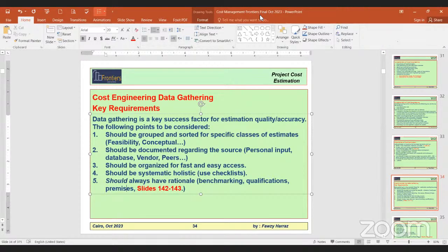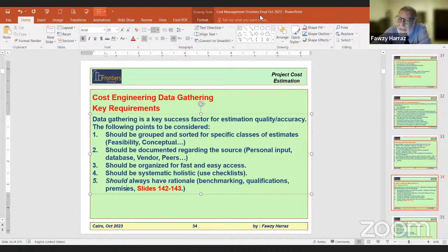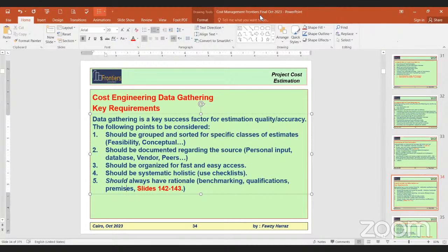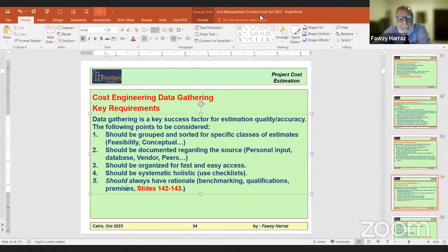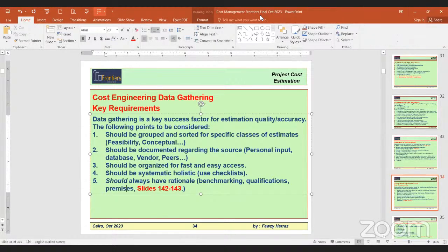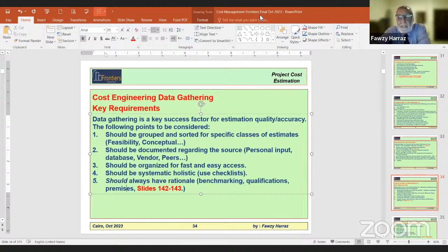But I have faced that most contractors do not raise this in the clarification. There's no talk about this major item. I think the FIDIC process requires them to share any such clarification from any bidder with the others. They share the clarification, because they did not catch it. You caught this error and flagged it, and they would share it with the others and say, bidders, please reissue your revised commercial, including this item that Engineer Noura kindly notified us about.